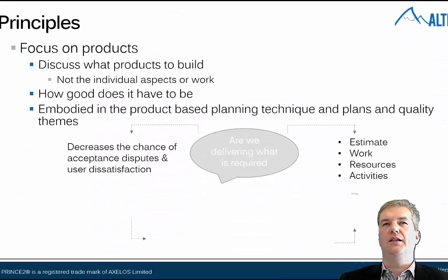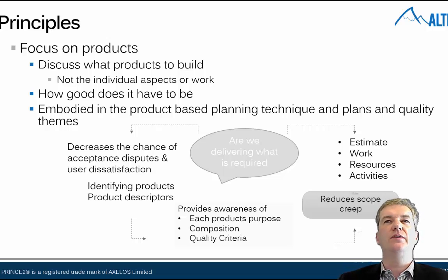Okay, focus on product. Another great PRINCE2 concept here is that we're not just focusing on the individual aspects of the work, but we have products. And by products, we mean that they are deliverables that have measurable size, measurable features that we can say, right, okay, when it's done, we know that it has these certain features. And it's really getting back to, are we delivering what is required? If we have a very tight understanding of what the requirement is, we can document that in a product, say, these are the features, and we can look back and say, right, I have delivered what the features of that product are.